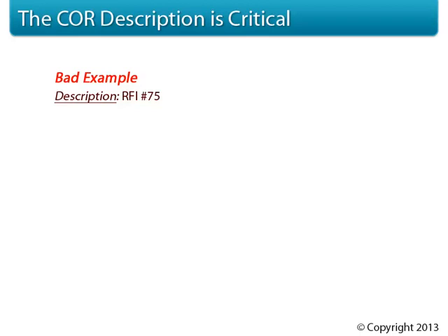The sub will know in this hypothetical example that type A non-rated walls were called out in the drawings, and the type D wall that the architect said to use is in fact a rated wall, so it'll be built just fine. However, an owner with little or no construction experience won't realize what this cost is for. Since the RFI response just said, use type D walls, the owner doesn't even know if the drawing said to use type D walls in the first place or if this is a change. As far as they know, a wall is a wall.